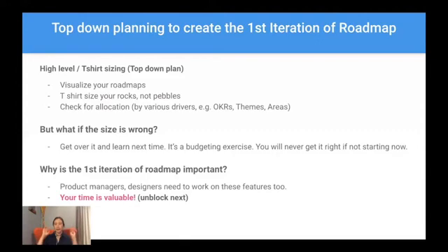Top down is something like this. I have features X, Y, Z, and we'll talk about the feature verbally, or maybe have a PowerPoint deck or whatnot, with very high-level wireframes between product and tech lead, to say, this is what we're trying to do and how big is the effort. Tech lead will say 6 weeks, 8 weeks, 16 weeks, whatnot. And that will give you a general idea of how big it is. And then you can decide to say, we have this much resources. These are many things we need to do. Should we do this or not based on the benefits and outcome, right?